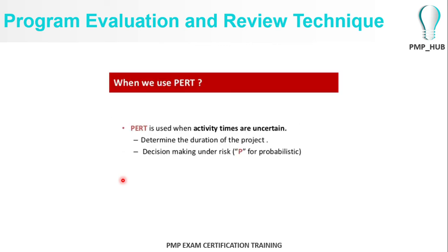So once again, this is also known as a PERT technique. This is where the activity times are uncertain for you, and you cannot pinpoint accurately that this is the exact amount of man days that is required. So there could be a probability, the most likely case, the activity can be finished between X number of days, or there can be a worst case scenario, the activity can be completed between Y number of days, and a best possible scenario that the activity can be completed within Z number of days.